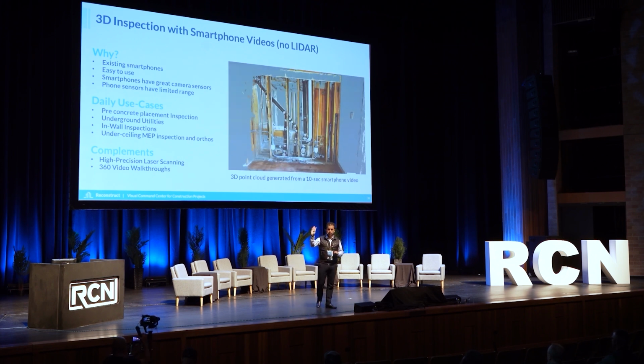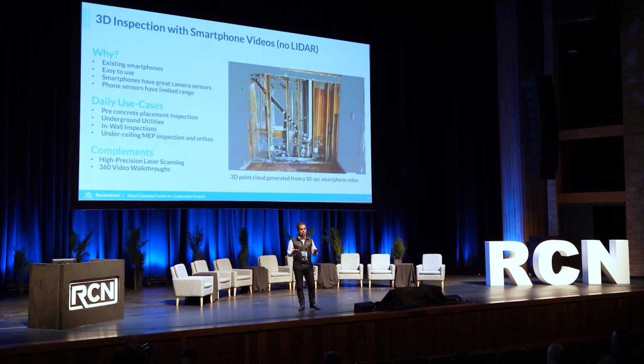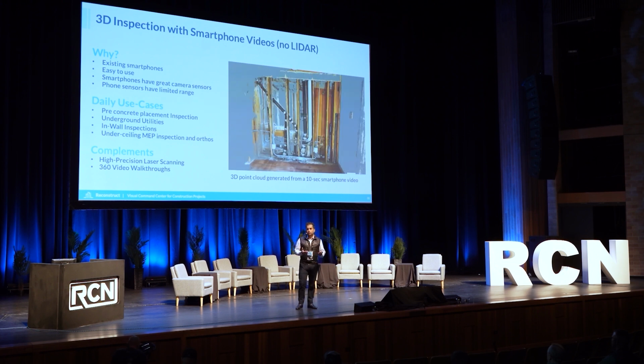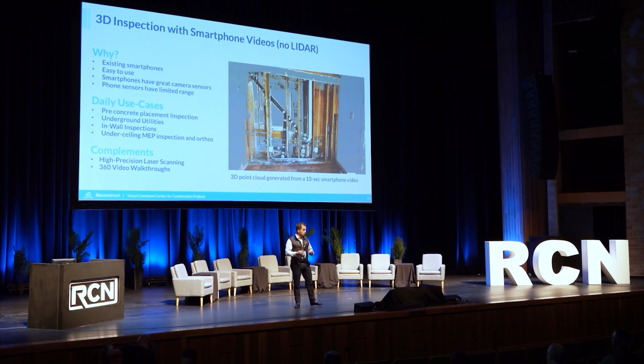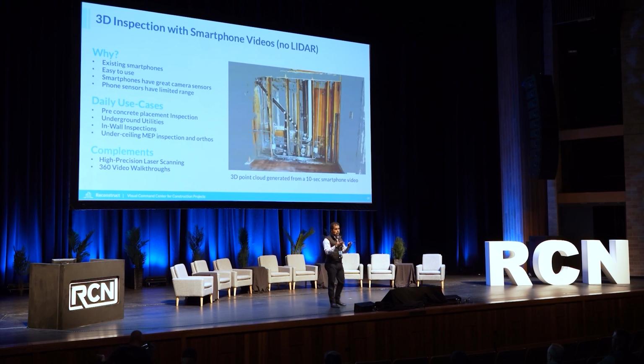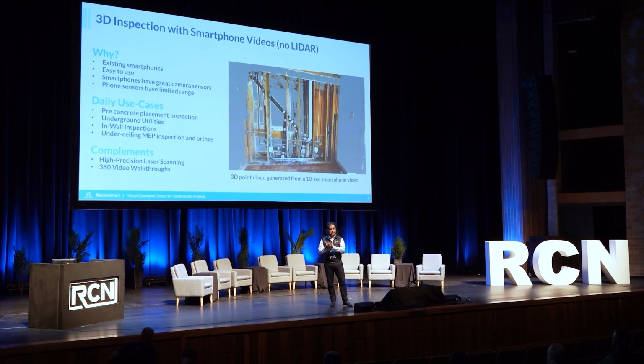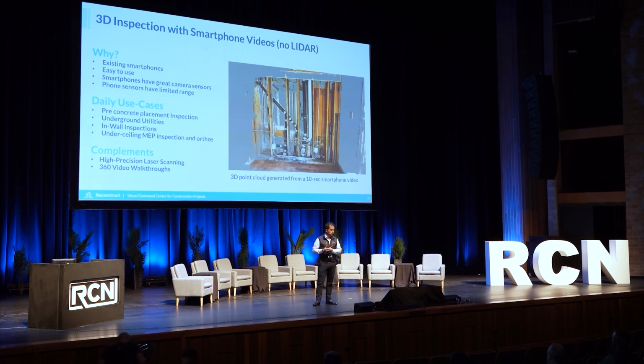What are the use cases? Before placement of concrete, have someone walk around and quickly videotape. Processing is usually on the order of a few hours. You can even optimize it to be on the order of 15 minutes to an hour, depending on how you process the data. The video goes into the system and gets processed, automatically aligned against the design. So for your team, it is entirely touchless.